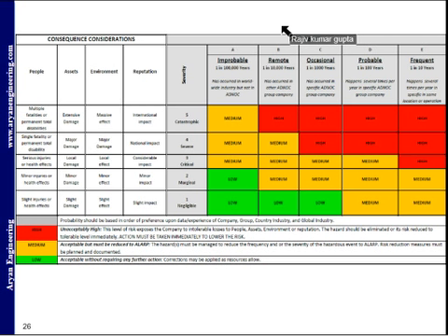Now this is the impact probability chart, which is based on the principle that risk has two primary dimensions. One is the probability. That means a risk is an event that may occur. The probability of it occurring can range anywhere from just above 0% to just below 100%.